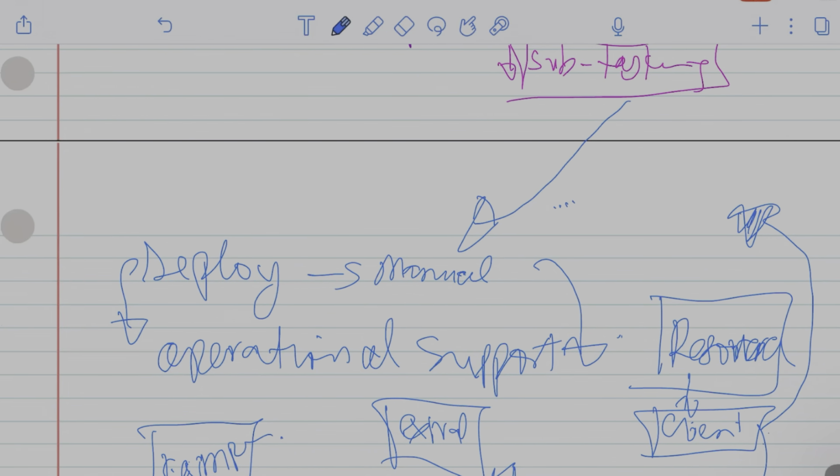So what I do is I ensure I tag all the stories and the features that are in the next release, and make sure that my team finishes that before time, and we are able to support them to get their release out on time. And we always put like a sprint buffer, which means that we need to get everything out at least 2 weeks before the date. In that case, if we're missing something, we can fill the gap.